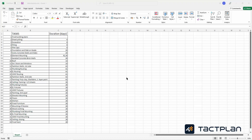Before you start adding tasks in TagPlane, we recommend that you have prepared a task list in advance by involving the different trades in defining the relevant tasks. When you define tasks, we advise to detail the task to contain the actual work you do on-site. For instance, a task called Wall Framing and First-Side Gypsum is better than a more overall activity called Carpenter Works. You can, by advantage, consider the dependencies and order when you make your task list. Once you have prepared your task list, you are ready to create the tasks in TagPlane.